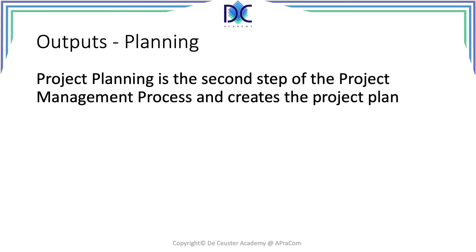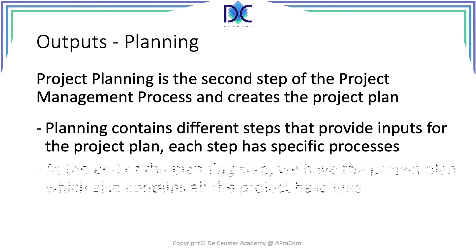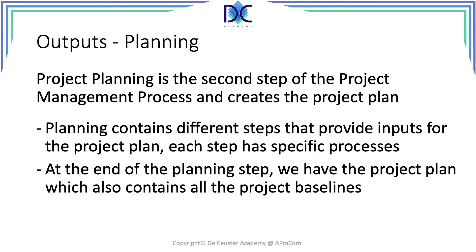Planning is a little bit more complex because once we have a signed charter, we will start by creating the project plan. The project management plan is about different elements — creating those different components. We talk about scope, schedule, cost, risk, and all kinds of things. We will look into that deeper later on. At the end of the planning step, we have what we call the project plan, and the project plan contains all the baselines. The baselines are important because they are the plan that we want to complete and implement, and they provide the necessary information to execute the project.